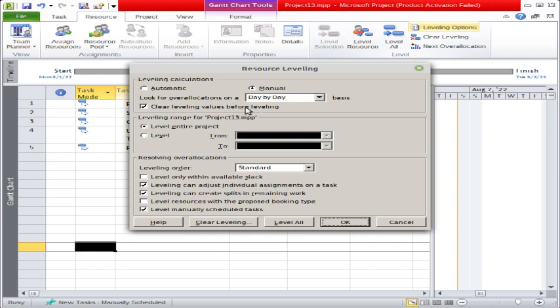Then there is 'Clear labeling values before labeling,' which means whenever the software is labeling, it will clear previously leveled over-allocation problems.